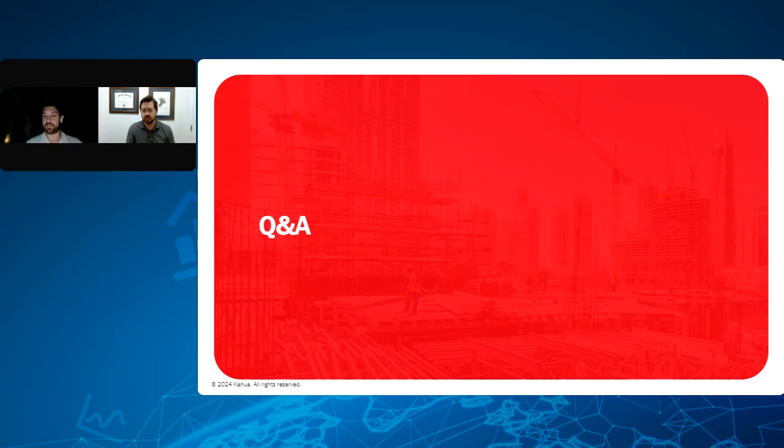Another question, is the cash flow using the WBS app or other sources? Is the cash flow analysis in Kahua conducted using WBS or breakdown structure app, or does it utilize other sources such as the transportation example shown, or was the data from P6? Great question. The cash flow we showed was pulling data. We have a cash flow tool, or we call it a cash flow app. It connects our cost data and milestones or imported P6 or project schedule data in to project cash flow.